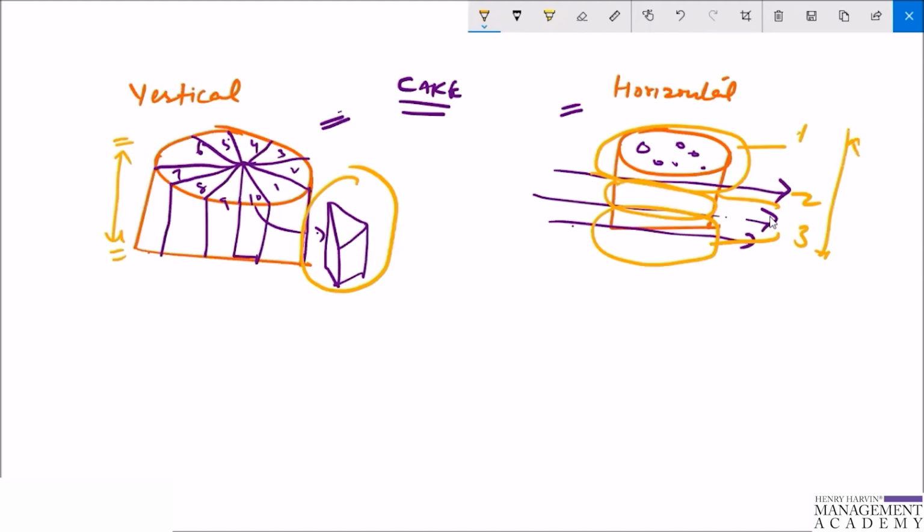So individual items do not result in working, demonstrable software, because suppose that a team works on an order process for a web shop in a sprint. If they would split up the user story horizontally, they would end up with the work of design, database, maybe front end and testing. Although the items are certainly smaller, they don't deliver working software on their own, right?